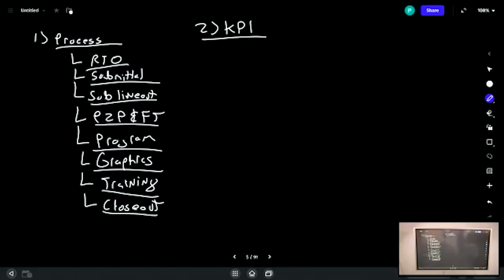RTO handoff prior to booking. Why? Technically you could book it and then do release to operations and re-estimate it. It really just depends on your company's booking system. Some companies, you're going to book it and then re-estimate it in the project. And sometimes you're going to re-estimate it prior to booking. The sell price is not going to change. What's changing is the costs. So the sell price is going to stay the same, but the costs are going to change.